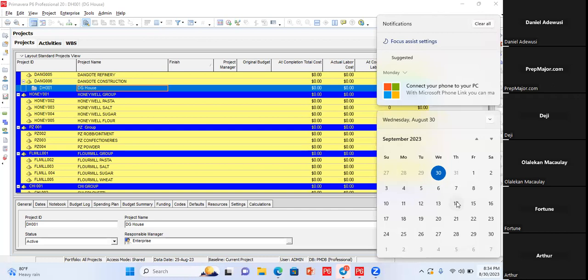We got it right. If you don't ask, you might say, okay, 10 days: 1, 2, 3, 4, 5, 6, 7, 8, 9, 10. We finish on the 10th. And then the project director asks, when do you think that project will finish? You say the 10th, and they'll come back to you: do you know what you're saying? Have you asked about our working calendar? No. So why do you think it's going to finish on the 10th? We don't work weekends. So these are the questions.